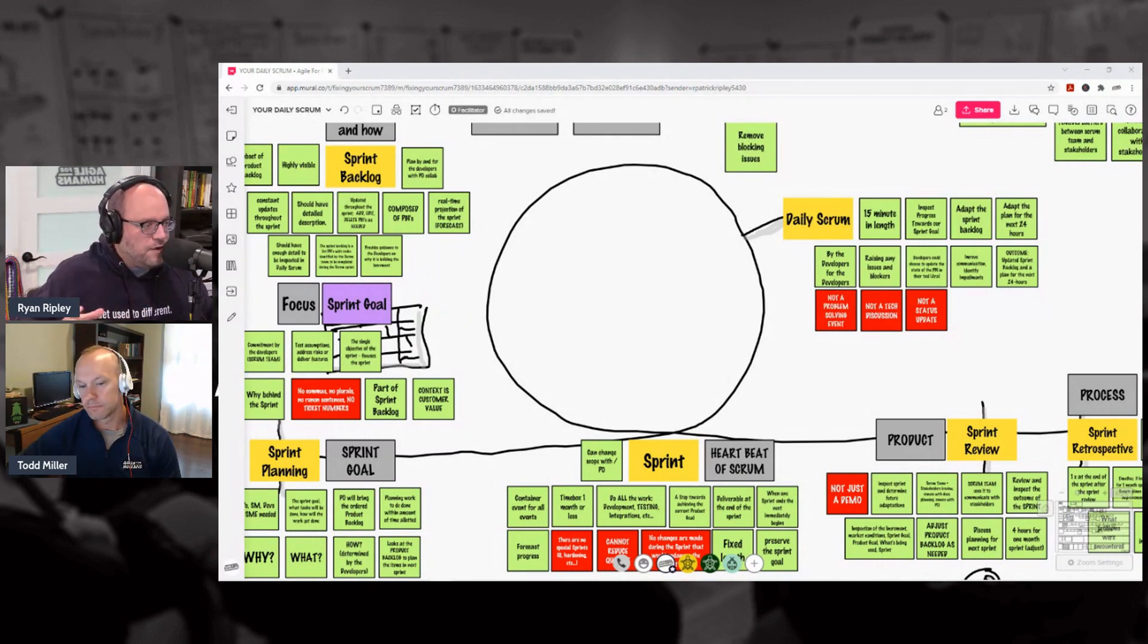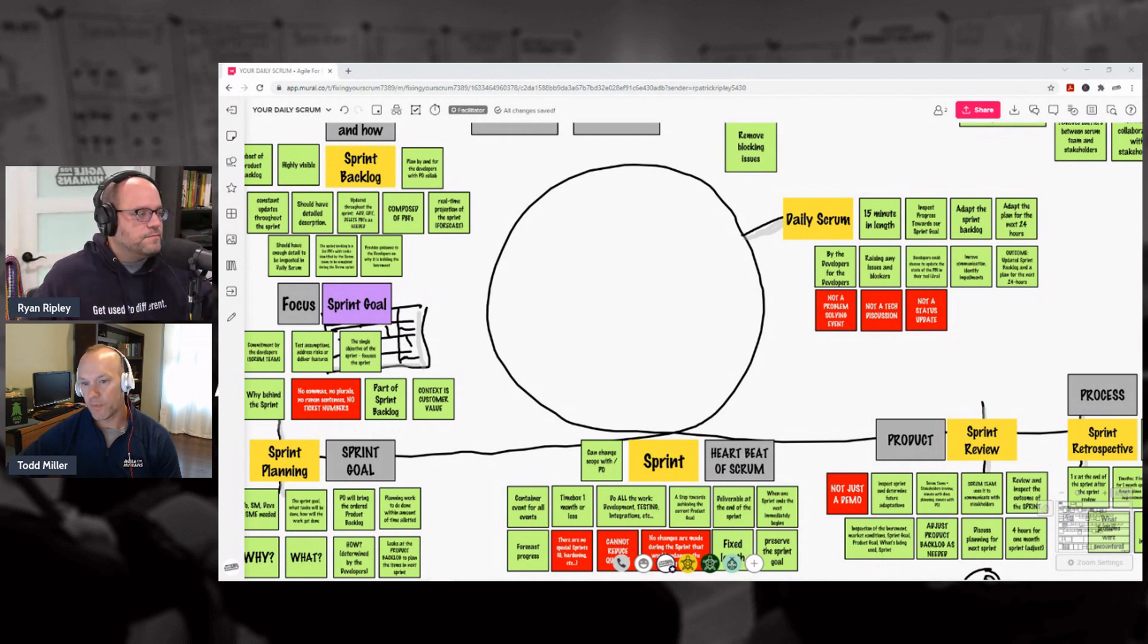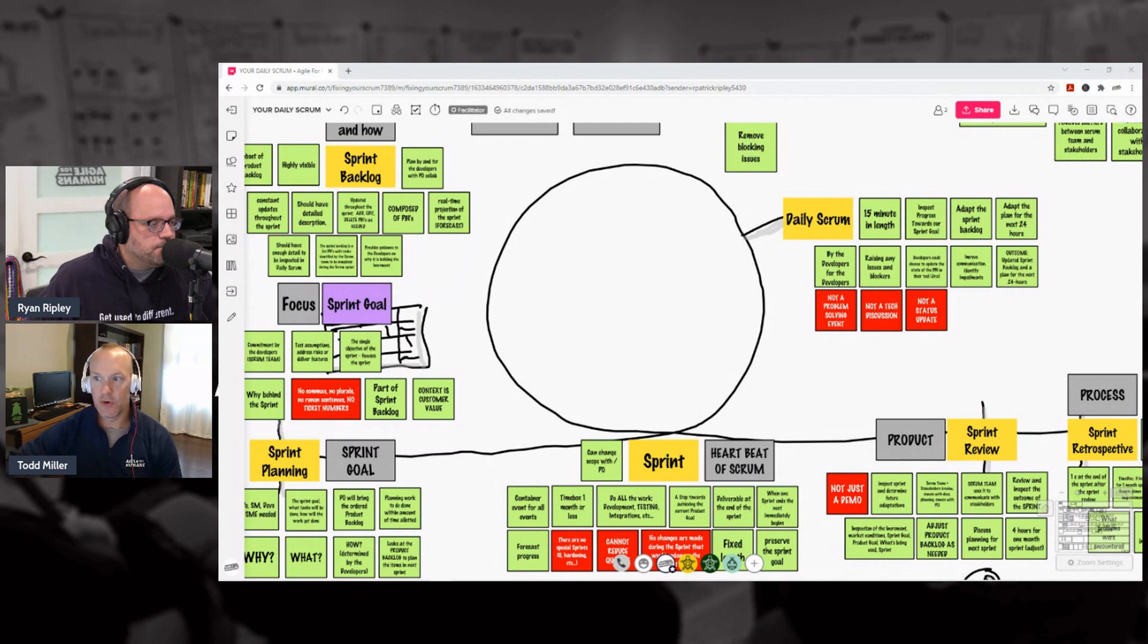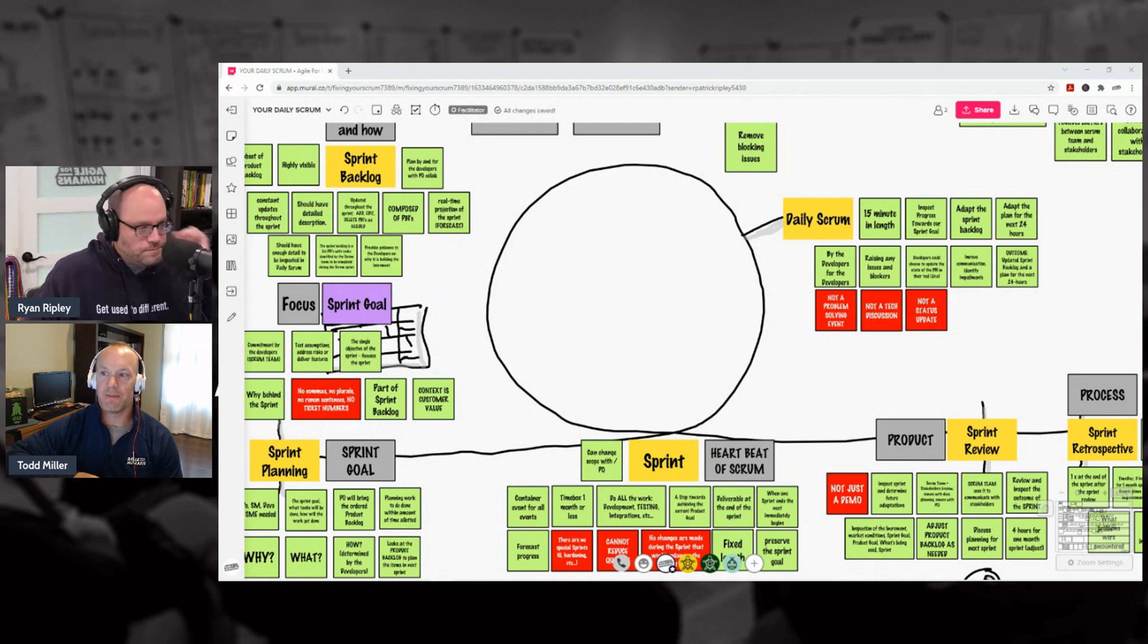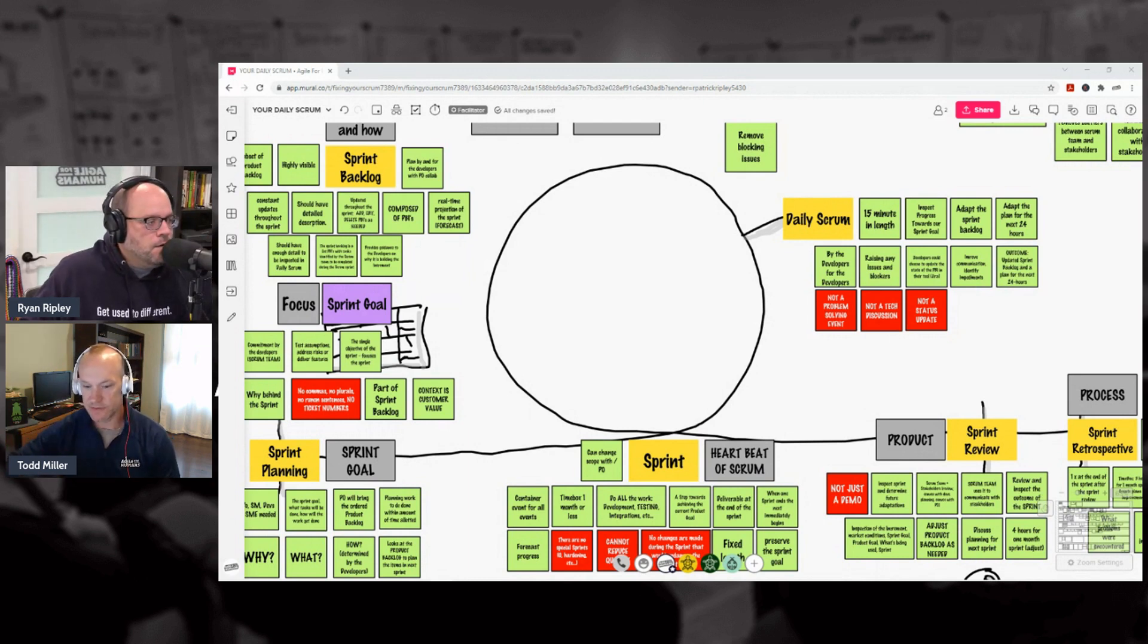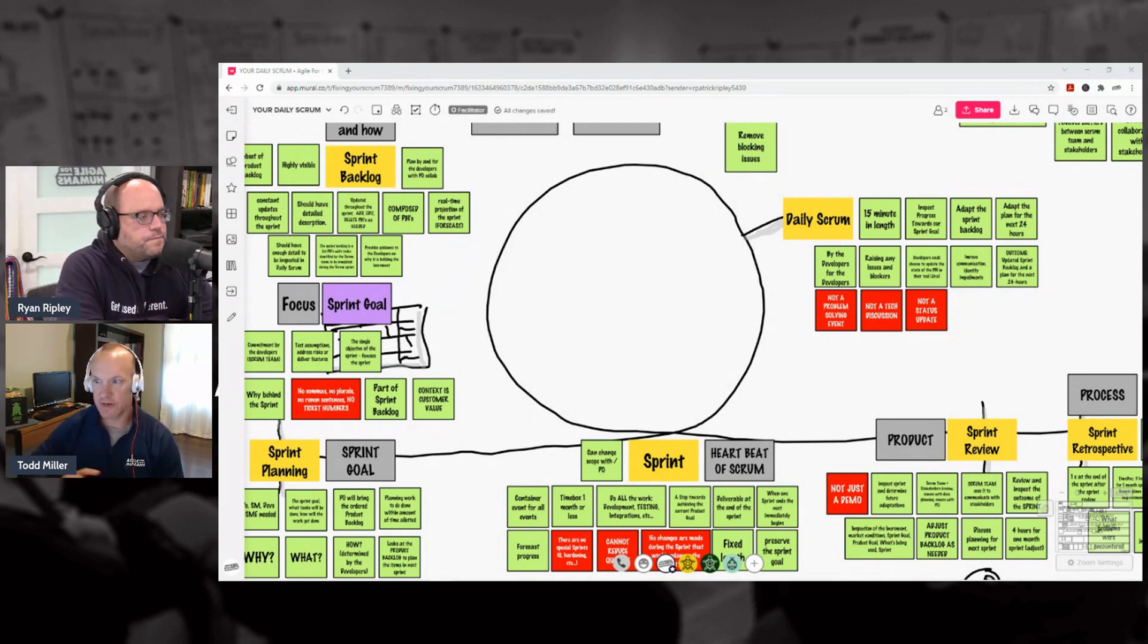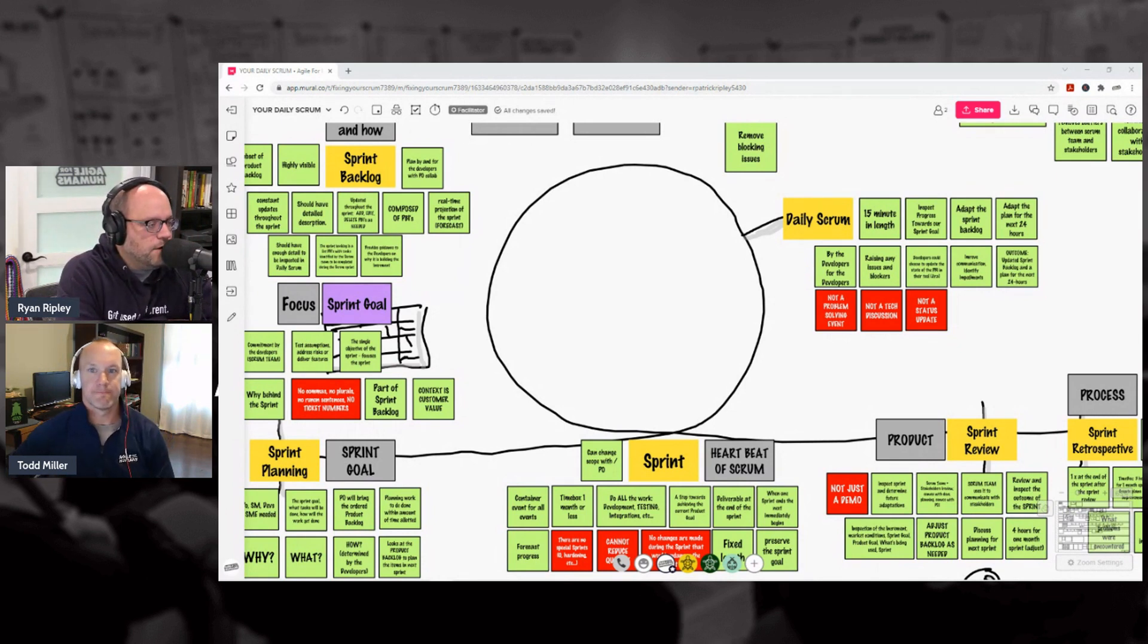Everything's happening within the Sprint, so the Sprint is always present. It's always important to point out here that there is no time gap between sprints. As soon as one sprint ends, as you said, the next one immediately begins. No days or hours or anything—it literally begins, should begin right away.